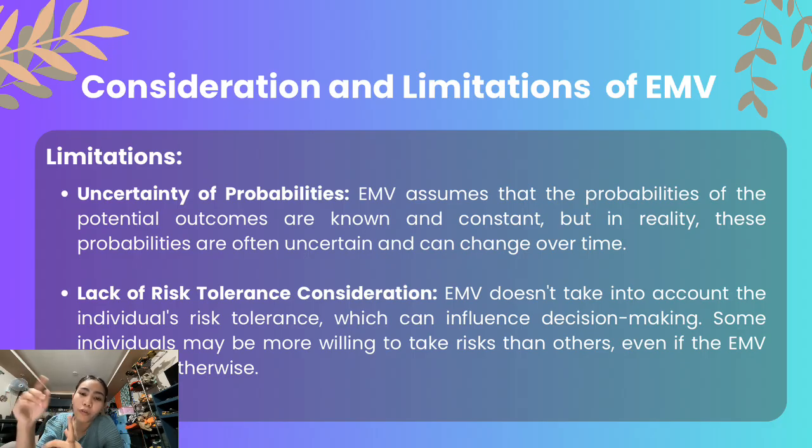could be overly cautious. So I remember this from our risk management subject, wherein we assigned probabilities to risks, which we ranked, which we multiplied by the impact of the risk, and then we ranked the results, and whichever had the highest value, we then chose as the risk champion.